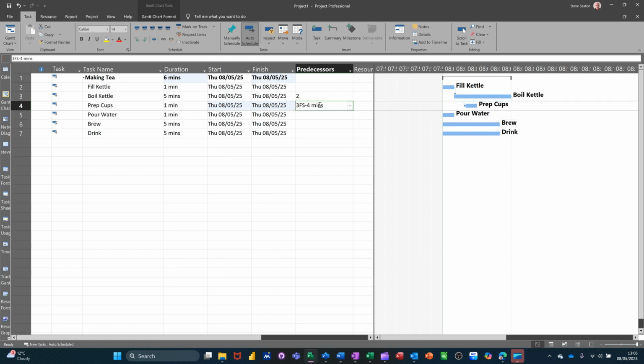I'm going to go 3SS, start to start, plus 1 minute, because that would be how it would be. You wouldn't prep the cups until you switch the kettle on, so boiling the kettle is when you're doing the cups, as you can see there.